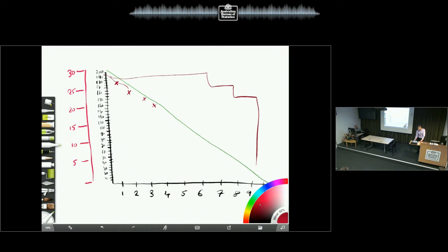Now, if the trend line looks like this, that's a bad sign because that means somebody's gaming the system, because it never looks like that. What typically happens is you get started and you think, whoa, that 4-hour task is a bit larger than we thought, and things spike up, and then we start trending down again, and then we have a problem, find another problem, and it goes down, and then we get close to the end and this happens. So a burn down chart may look like that, which is really fascinating, because in the retrospective we can say, hey guys, what happened here, how did you feel there, and didn't that feel great there? So we can talk about the events.